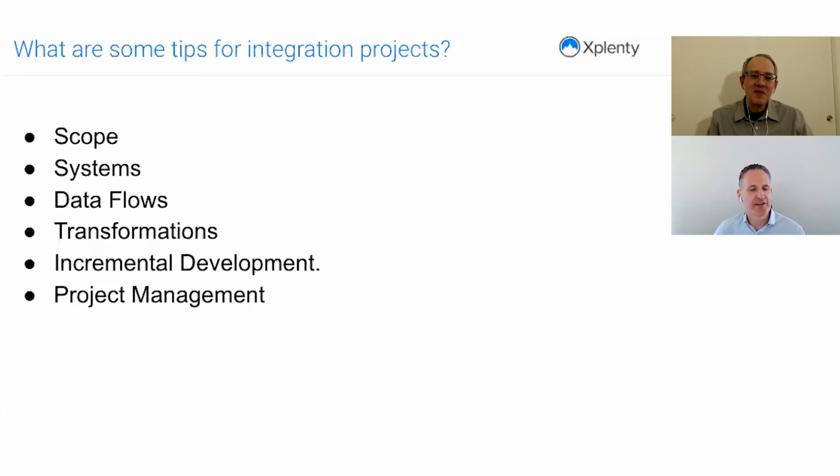So if you're going to do a big integration project, do it almost like one pipeline at a time. Just deliver one thing, if one integration into Salesforce, get it out to the business, get feedback on it, deliver it, move on to the next one. Because every time you get one of these wins, you're getting almost like the benefit from the business. They see the advantage that you've done. They support the future work. They get excited about it.